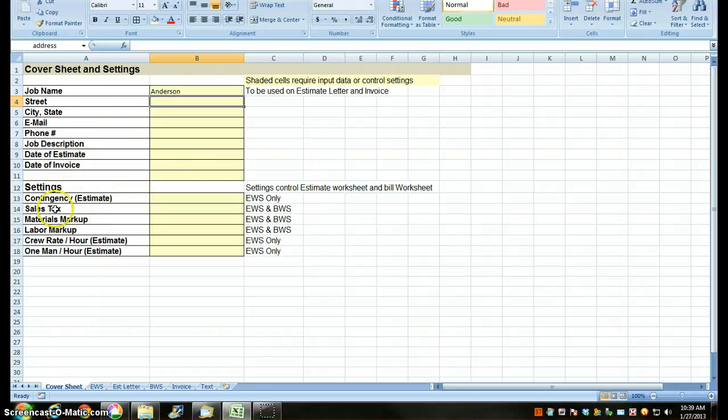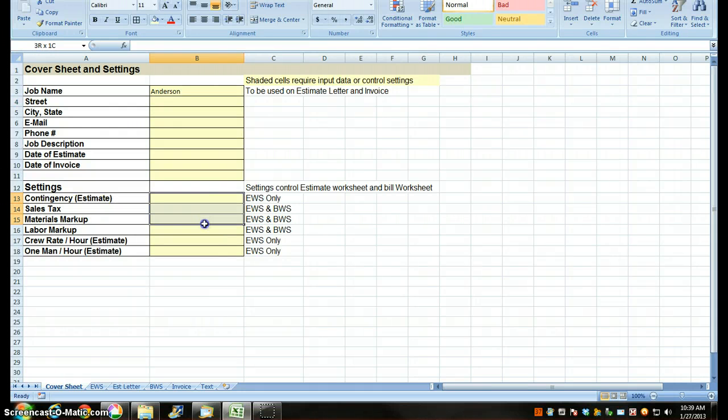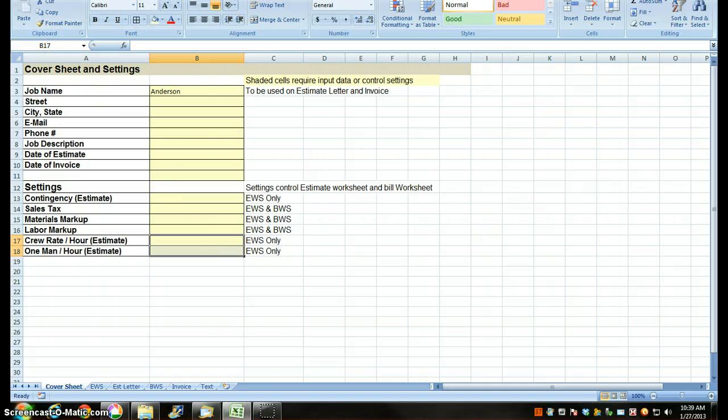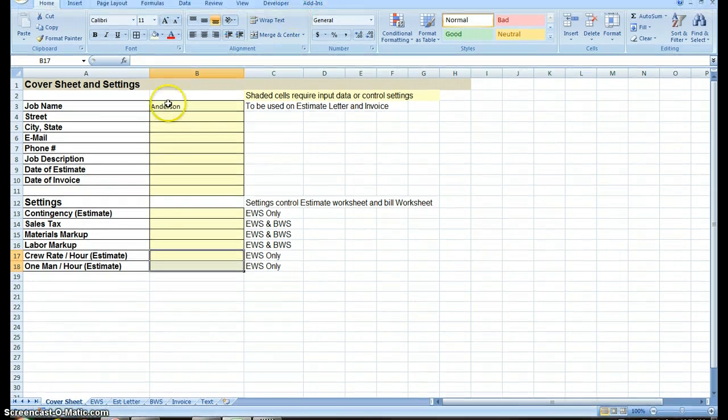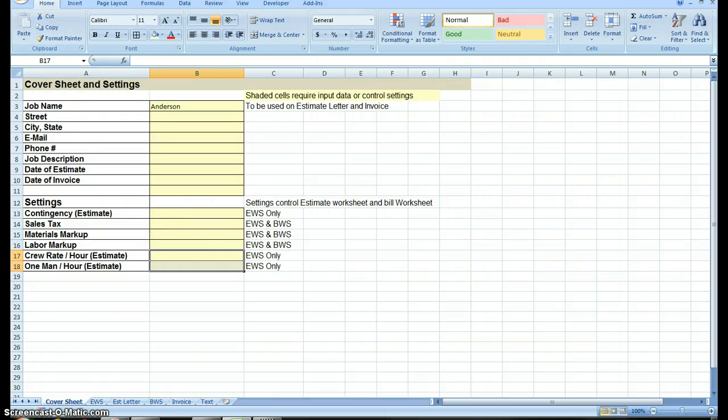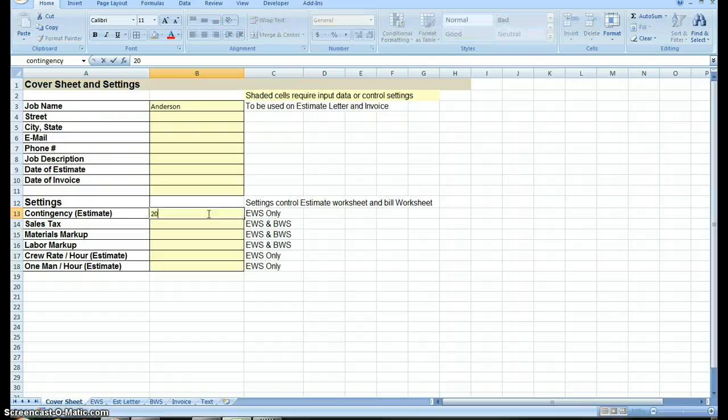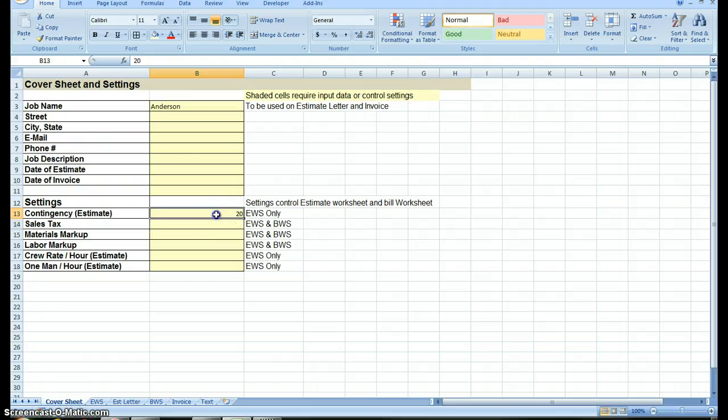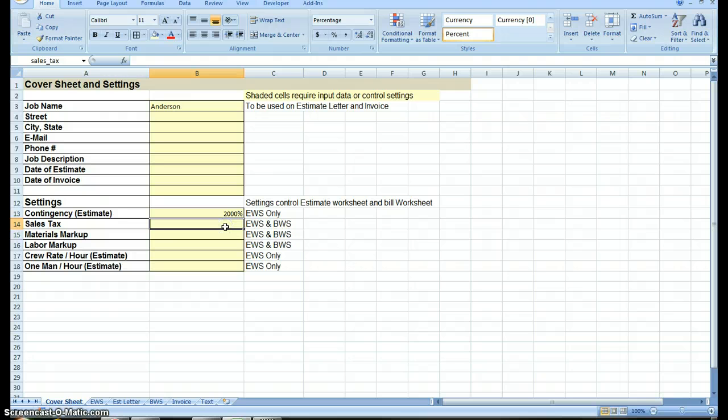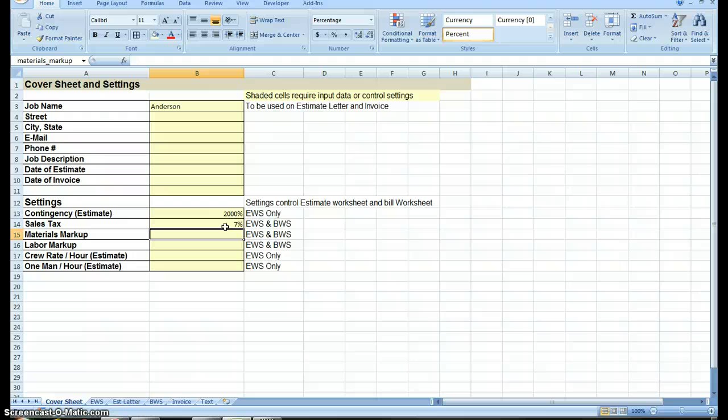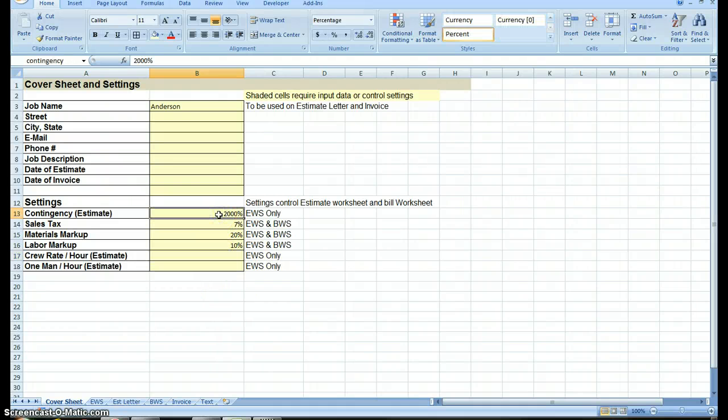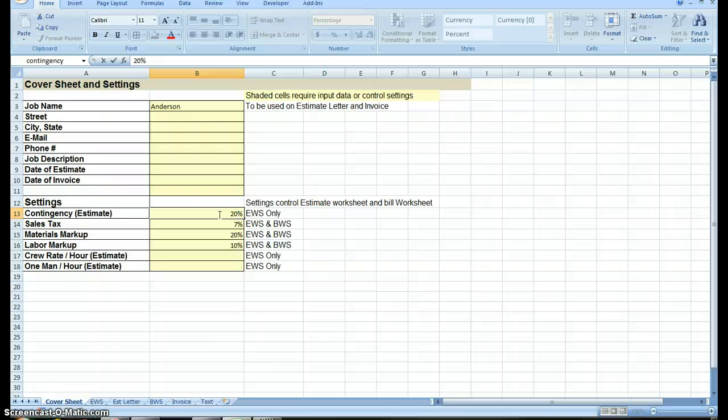Down here is my settings for contingency, sales tax, labor. These are all going to be percentages. I better put them in a percentage. I want 20% contingency, but if I don't have that percentage in there, now watch what happens. Now that's 2,000%. In Iowa, we're 7% sales tax, materials markup, I'm going to go 20%, labor markup, I'm going to go 10%. Now I'm going to have to go back and correct this, and just put in 20%. Now that it knows that it's a percentage, it reads my input differently.